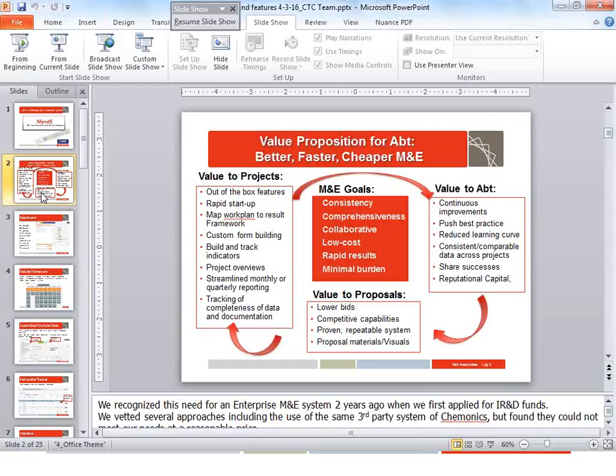And the other piece is you might want to be calculating some indicators based on the types of things that you do. Let's say you're doing, I'm going to use trainings as an example because I think it's the easiest one for people to get their head around. Let's say you're doing trainings, you want to increase the knowledge around a certain topic. So maybe your indicators are the number of people trained and their level of increase of knowledge based on a pre-test and a post-test, those kinds of things.